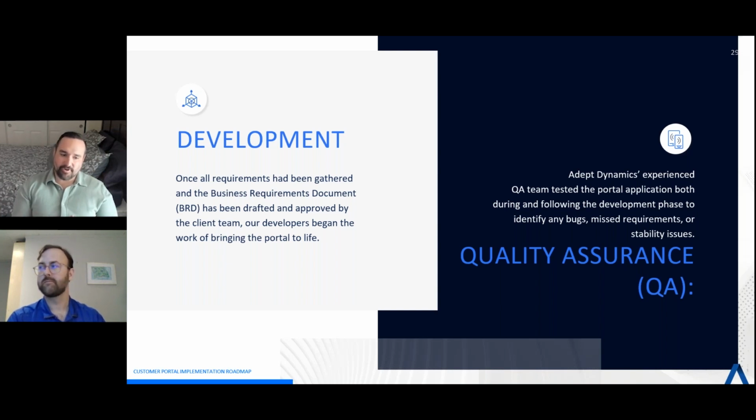That was a very poignant example for us. Anytime someone says HIPAA, suddenly as a database designer and engineer, you're like, oh, nobody mentioned HIPAA. They say, oh, we thought it was understood. You say, well, let's have a quick follow-on. It's the sort of thing that can completely impact customer satisfaction at the end, when they discover that your data model is not HIPAA compliant, and it's going to cost X number of dollars more.